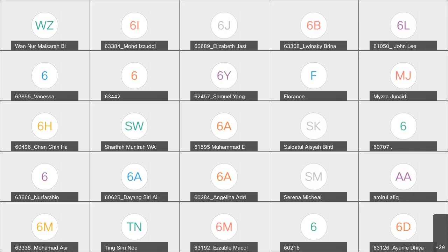You need to take out each component of the work and flow it into a flow chart of the work process, the quality checking and testing of materials, and what quality of material is expected. You need to show when you're going to do testing, and if the test fails, what you need to do next, for example.